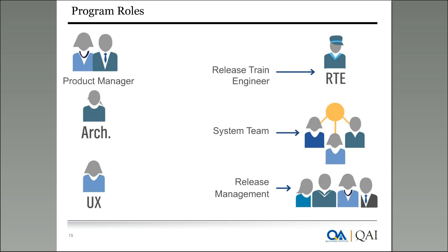There are events that have been very clearly articulated on how these investment themes get elaborated into a set of epics, the epics into a set of features, the features into stories, and stories into a set of tasks for each team. It is very clearly articulated, and there are events and activities very clearly put in the SAFe framework for doing all these things, right?